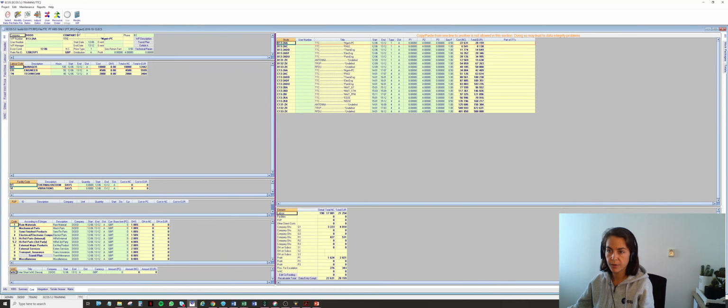So you see here we could have entered header, we can enter labor hours, facilities, other direct costs, WAC and sub, start and end date, price tab, and distribution profile. We can enter all information available in this screen. However, travel plan here and Exhibit A remain to be defined manually.